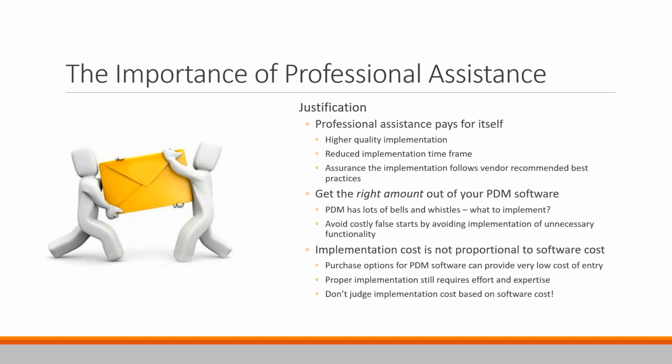You really have to decouple the cost of the software from the cost of the implementation. There's a very popular PLM system out there where the software is quote unquote free and all you have to do is implement it. Well, that's because the implementation is not trivial, right? The people that make that PLM software make a lot of money off of the services to get it in place. And especially with Autodesk and their new licensing regime, the cost of entry for PDM from a software standpoint has never been lower. But the software itself hasn't gotten any less capable, right?